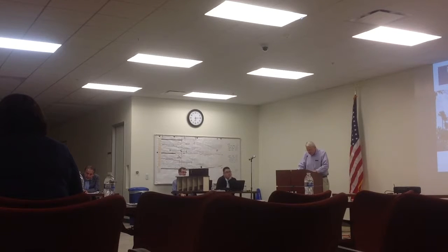There's been a lot of discussion in the press and tonight in terms of the costs per square foot and the cost per student. I think that would be useful on each project. I would hope that when you do those costs that you would include all phases. Some of these projects have multi-phases. So you take phase 1, phase 2, phase 3, but if you take all 18 phases in some of these projects and add it together, you'll get a different number.